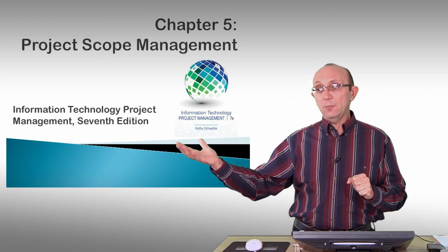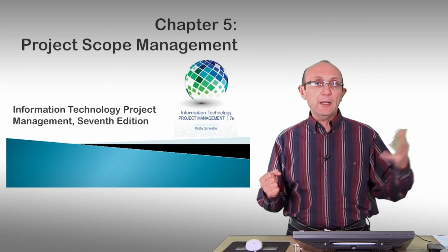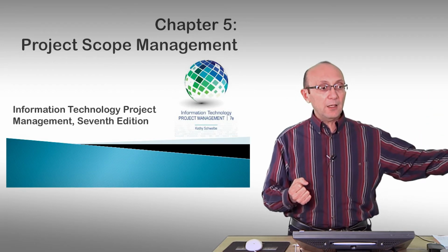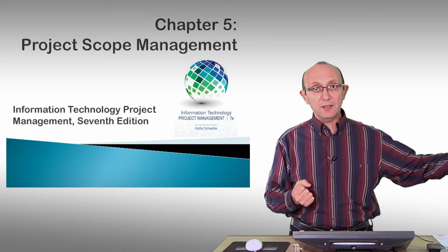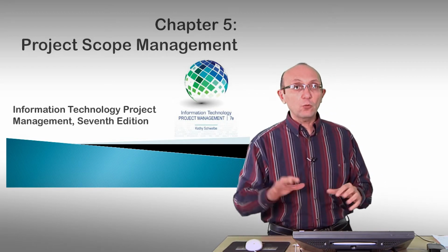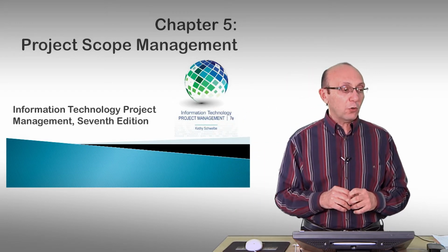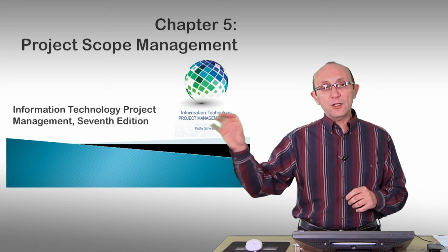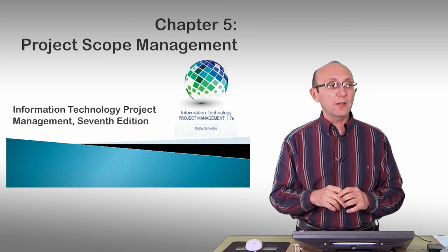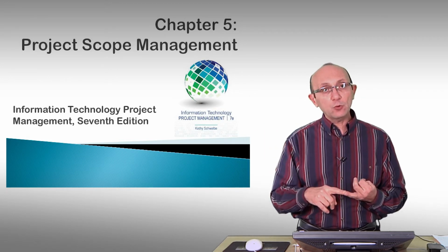No changes will result in you delivering a project that nobody wants, or the wrong project, as we say. Too many changes will add chaos and problems to your project management team, development, and everybody. If you work in industry, you probably know there are different mechanisms. We're not going to cover them in detail, but there is a change management process. There's something called a request for change, or RFC, which is basically an industrial standard, and that will help you put a process of when and how to change,